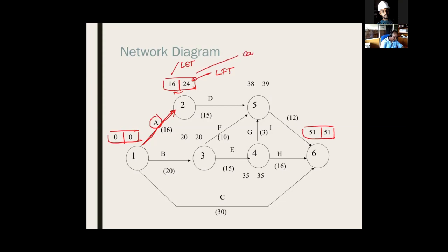It can be delayed by 8 days. 8 is 24 minus 16. Sorry, this is earliest finish time and latest finish time.